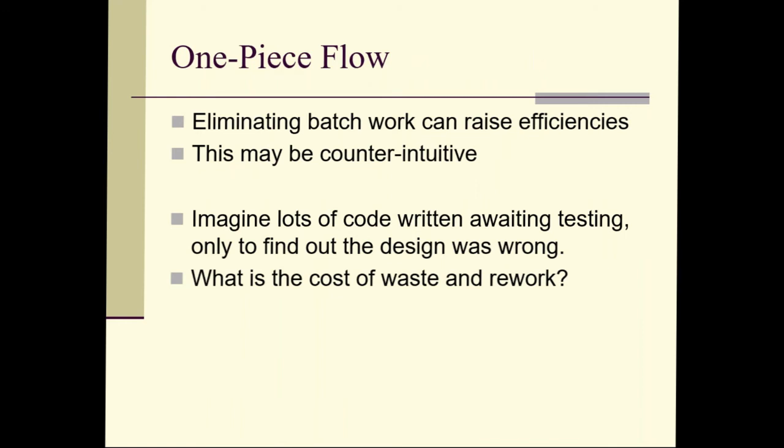And one of the last ones I want to talk about here in this category is this concept of one-piece flow. Again, this is that pull model, not a batch model. If I do things in batches, I get 30 things I need to do my process step on, and I do the whole batch of 30, then I put them into my work complete pile that's waiting for the person downstream of me to use them. If there's a change in design or specification, now I have 30 things I have to throw out because I rushed through them all and now they're garbage.